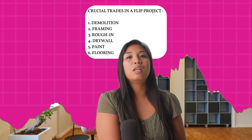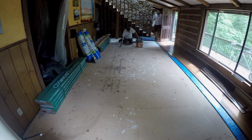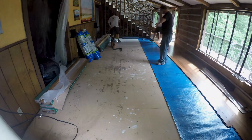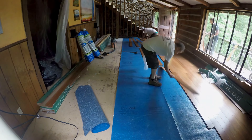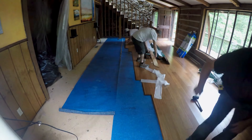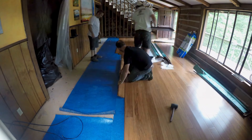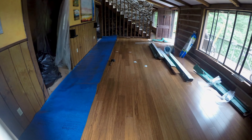Now that you're all painted, number seven is flooring. You'll need to install flooring and baseboard. Whether you're installing carpet, LVP, or tile, it's important you get all the flooring down before adding any appliances or cabinets.